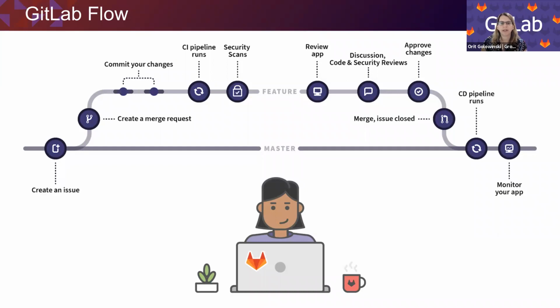We begin by creating a discrete unit of work by creating an issue or a ticket. We assign the issue to a team member. From the issue, we spawn a feature branch, which can be thought about as a parallel line of development. Developers move to the branch to interact with the request. GitLab provides updates and notifications on the state of the issue automatically.